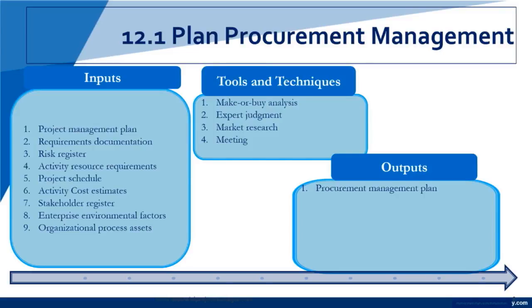Your procurement management plan will be present when you know you have to go out and get a vendor. Or it could be that it's part of this master project management plan, but in it you're going to make a decision based on the make or buy analysis. So it could be that we're going to determine whether we need to go and procure. But that should be noted within a procurement management plan in the master project management plan.